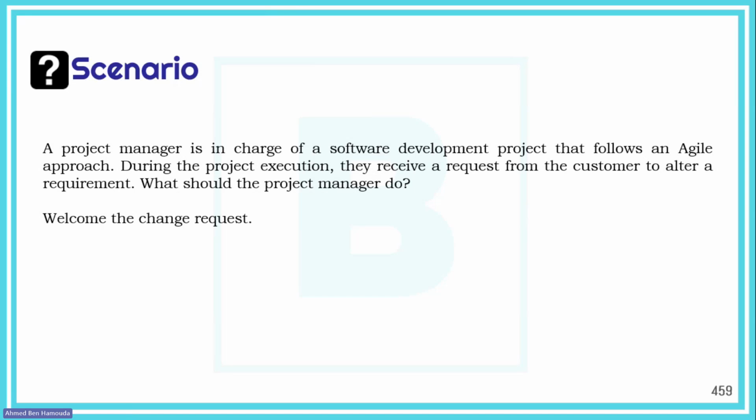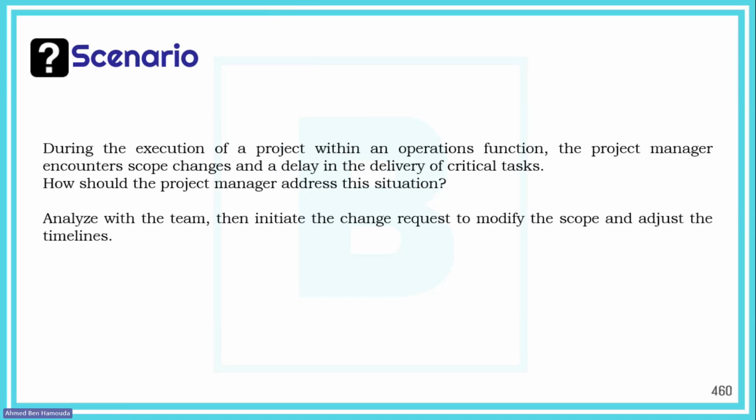So instead of having an 8 hour planning meeting for the entire sprint and then freezing it, now we will be having 4 planning meetings of 2 hours each at the beginning of each week, to ensure more flexibility, because we know that sometimes customers and stakeholders cannot wait until the next sprint to have us work on their requirements or their changes. Okay, so that was a way we figured of adding some extra agility to the sprints. But that's unusual, and that's not really counted in the PMP exam, right?